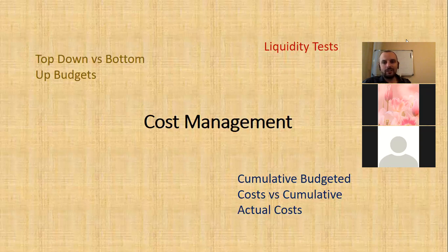Okay, so basically, cumulative budgeted cost is often quite jumpy, particularly at the end of every month, when you're having to pay money, or at the end of a phase, it might jump up. But a cumulative actual cost will be a much smoother line. And that's a much better expenditure line to track if you're going over budget or under budget.